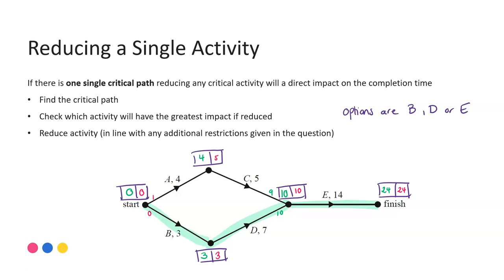Looking to find which will have the greatest impact — if there are no other restrictions, I think about what happens if I completely eliminate that particular activity, making it a dummy with a duration of zero. If B was zero, tracking forward, activity D finishes at seven, but I would have to move forward with nine from the other path, giving an overall completion time of 23. So B would only save me one unit of my finish time.